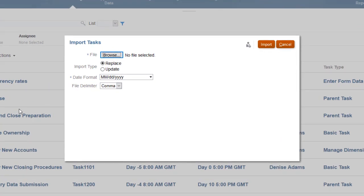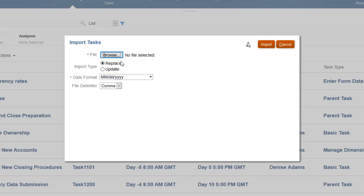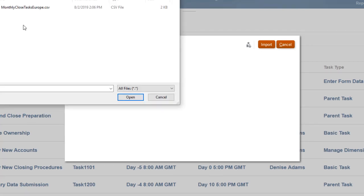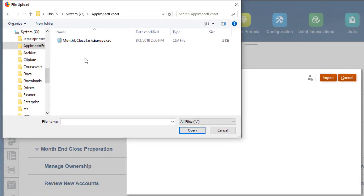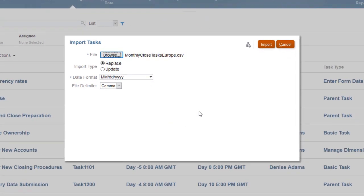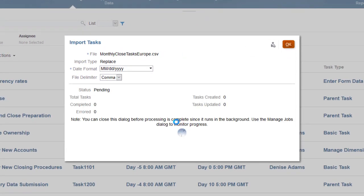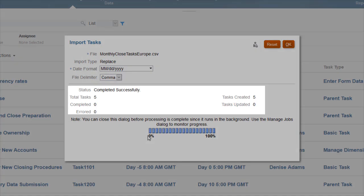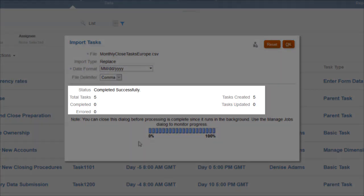You can choose to replace all the task information, or to update only fields with changes. I'll select a file to import. When the import is complete, a summary of the number of tasks created and the number updated is displayed.